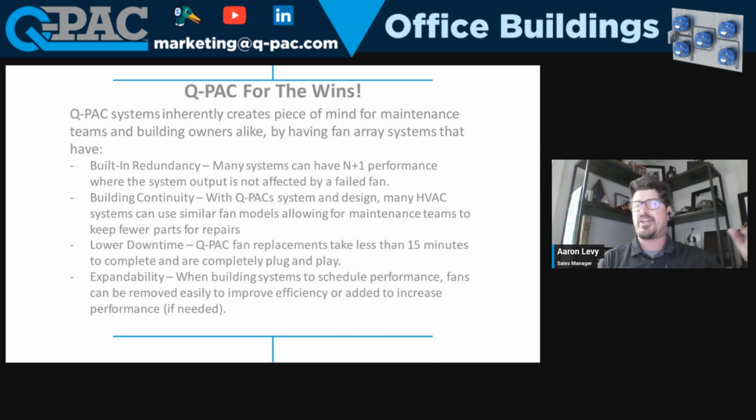They were talking about expanding a building over the course of the next 7 years, another 3 floors. So the way that the bid was going out is they wanted to have all that equipment at one shot. And my concern in my talk to them was, instead of my competition building you a 60,000 CFM array that's going to go into a building that has 3 floors that aren't even built yet, you've got this giant system that's not really collapsible. We could build a system that is expandable over the course of your next 7 years.